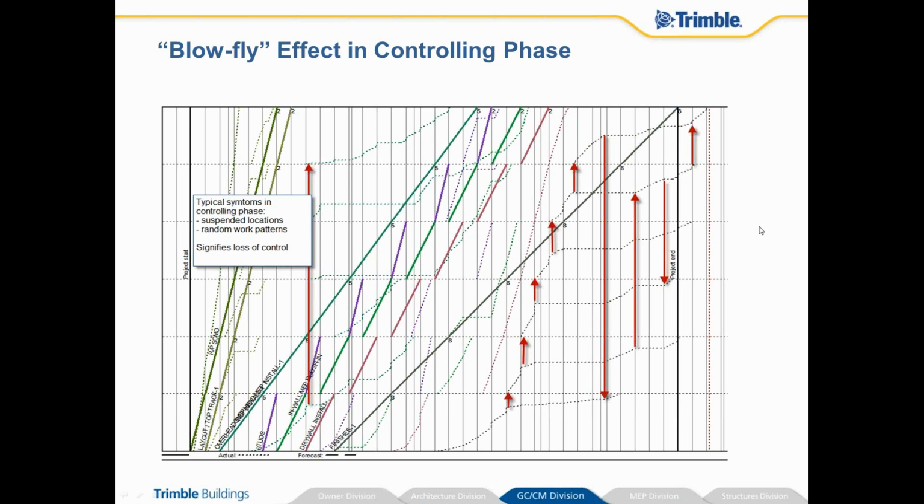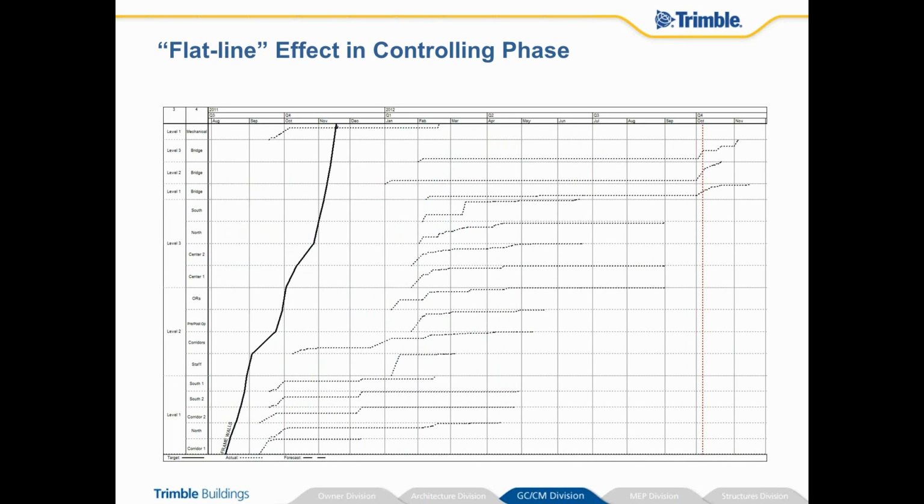We also observed flatlining, which in hospital construction seems kind of funny. But this was the result of starting in one project location, finishing it 99% of the way, before moving to the next location, finishing it 80% of the way. And you can see how long some of these suspensions were occurring for. We're talking several months at a time for framing walls in this example. Even more months, sometimes in excess of 9 months, completing just 25% of a location. The impact to the resource usage, again, the cost of the demobilization, and trying to manage a subcontractor that has bidded so many hours. It's a circular effect that impacted the overall ability to complete this task on time.